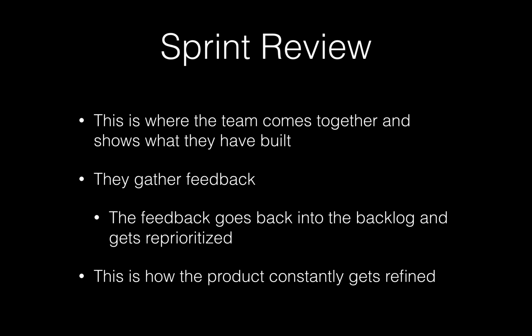Sprint review is the last ceremony of the sprint. This is where the team comes together and shows what they've built. So they show the product. They show the design. They show it working. And what they do is they gather feedback entirely from the team and from customers. The feedback, again, becomes stories or bugs or issues or defects and goes back into the backlog.